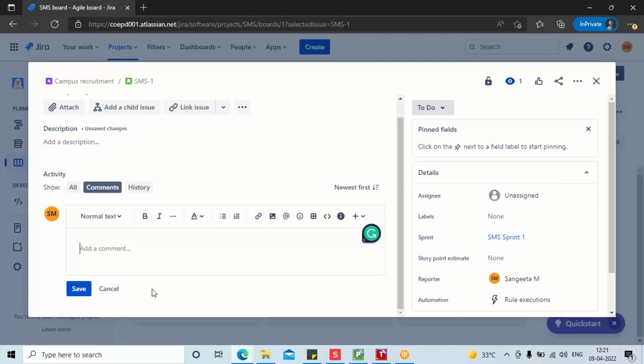After completion of user stories, once finalized, will the client give a signature? No. When the client is doing the testing, that itself is the sign off on this specific user story. Then whatever is mentioned is able to get it. He will say done, over. Then it will be sent to the deployment. You don't get a separate sign off again.